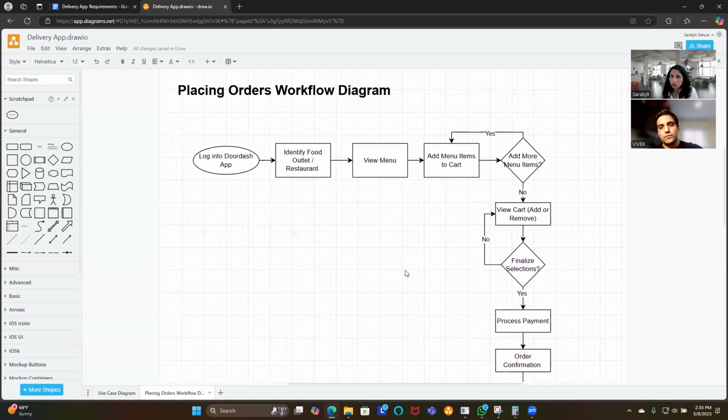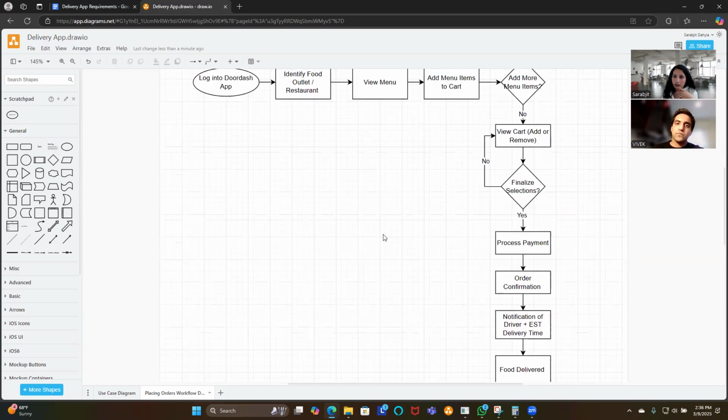So once we do this, as a business analyst or even a Scrum Master, even if you're trying to write requirements or user stories, you need to create a workflow diagram of some sort to make sure that we haven't missed anything. I always meet with my stakeholders, send meeting notes within 24 hours of what we talked about, any decisions we made, and then the next steps: review this and let me know if there's any edits or changes. And if there are none, let me know if this is finalized so we can move on to the next step.